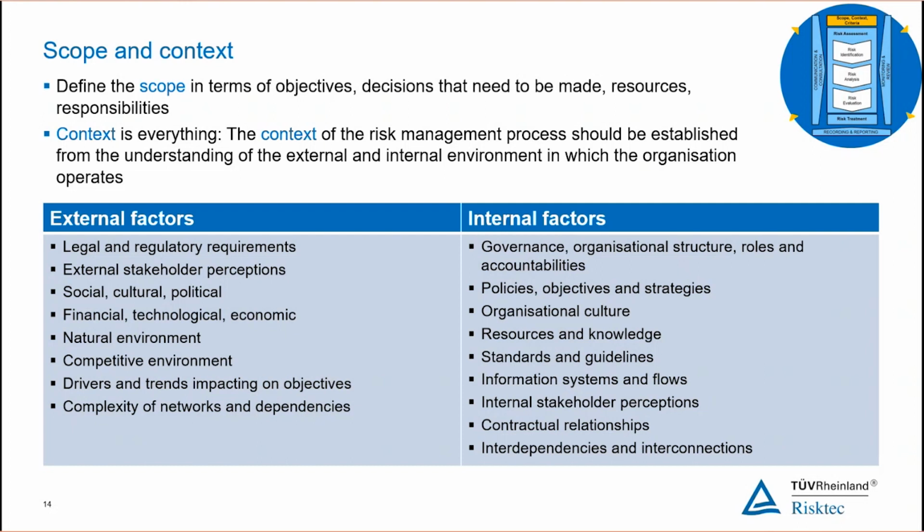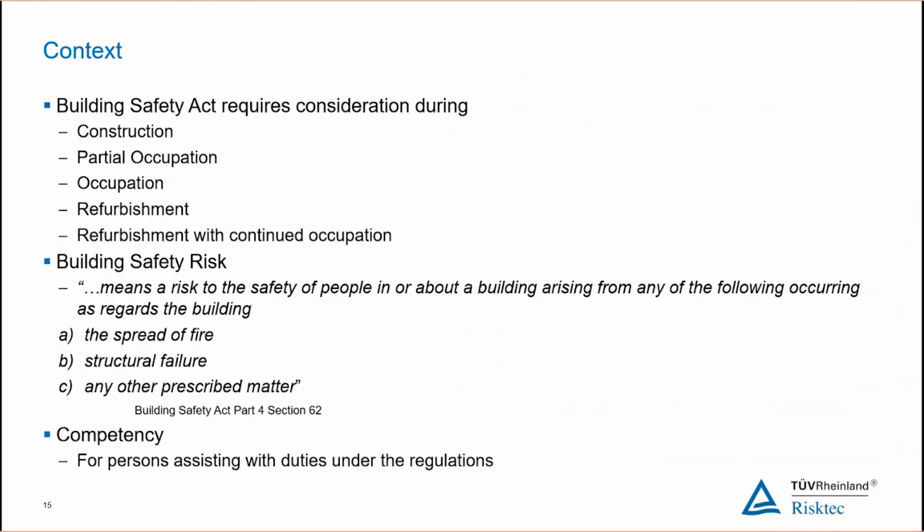How are we going to judge the acceptability of the risks at that point? That has to be set out before we start to get into this. As I said, the key context within our whole area of building safety assessment is set out for us by the legislation, so the Building Safety Act requires consideration during construction, partial occupation, refurbishment, all of these stages through life, because there are going to be risks that exist within the construction phase.